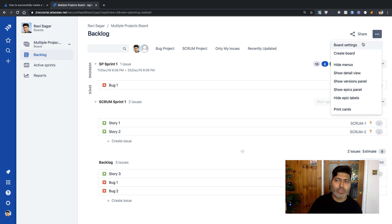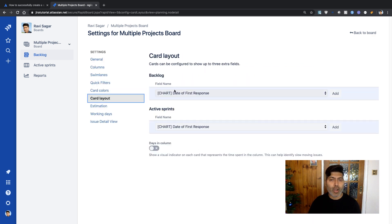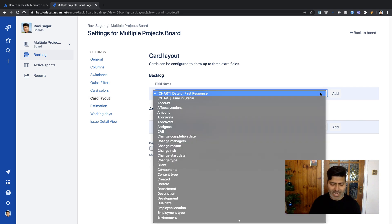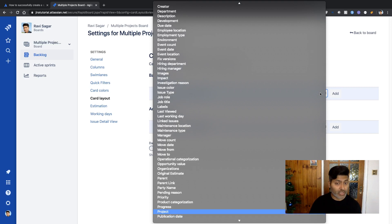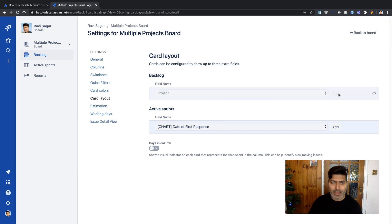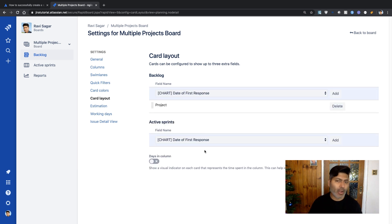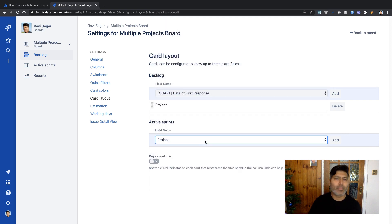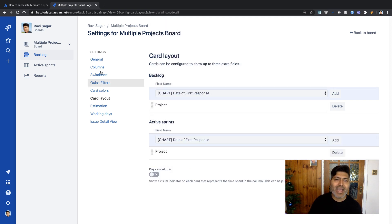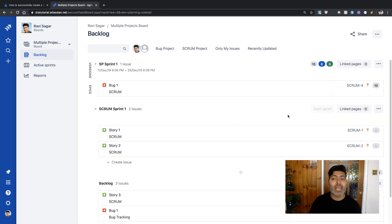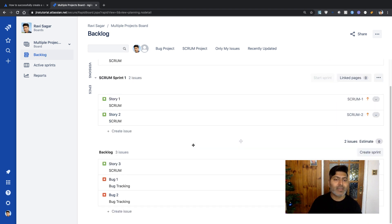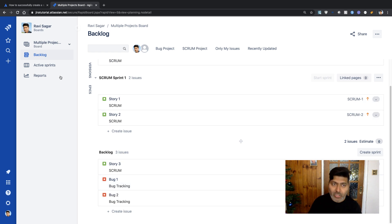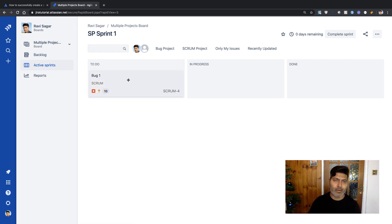If I go to Board Settings and then Card Layout, we're looking at the backlog view. We can add additional fields like Project. If you select the project name under Field Name and add it to the backlog, and do the same for the active sprint, you'll have a new field that clearly tells you which project each issue is from.